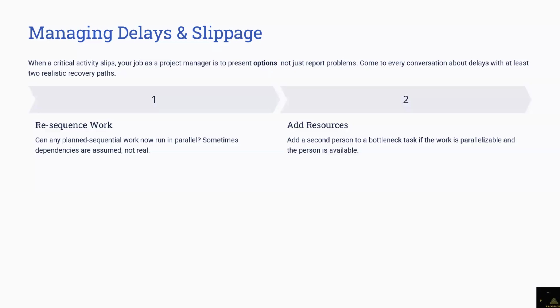You have to look at the schedule. If you work overtime, you'll be able to finish at this particular date. Now, there's a cost implication, because there will be extra hours that you have not accounted for before, and they come into play because you need to finish at that deadline. So you calculate the number of overtime hours people are going to work, bring out that 0.5 element, see what the cost is, check it against your margin, and you have to make a decision.